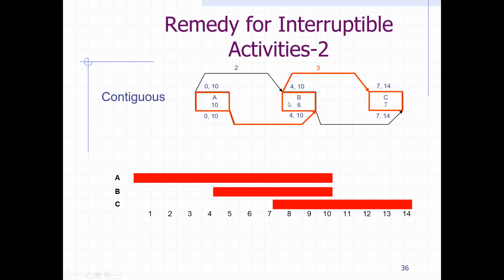However, activity B has been given a lag of 2, and it's uncritical. Since we have the starting date, the early start of activity B is 4. Let me grab my laser pointer. It starts at 4, so we are within this gap of 4 days for B to start. So even having a lag of 2, it won't affect our sequence here.